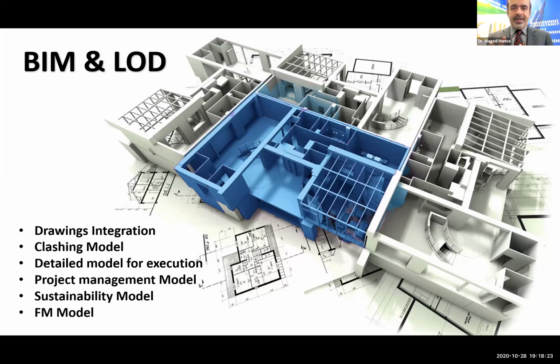All the drawings should already be updated under configuration management, with every variation, every change coming, or every request. Then simply at the end of the project and the handover, it is there already. I don't need to develop it. I don't need to prepare it.